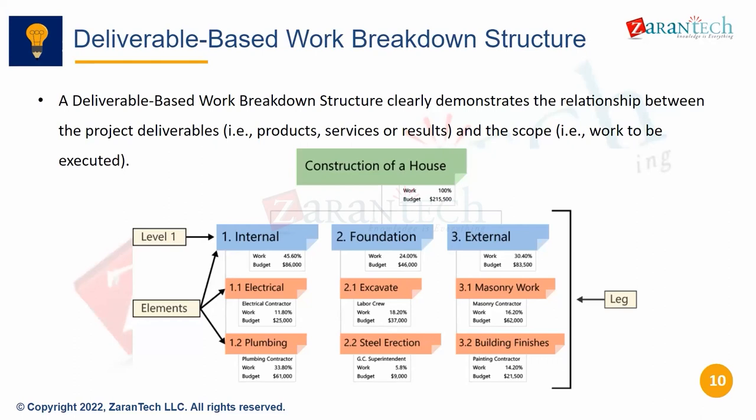So we have a SAP implementation project. What we can do is break it down into phases. If we look at the Activate methodology, we have four phases. One is prepare, second is explore, then we have the realize phase, and then a deploy phase. So those will be the four phases. Then in the prepare phase, we'll have the project plan, and then, let's say, BPMN.